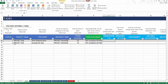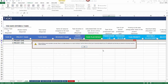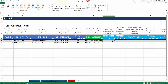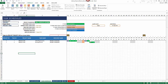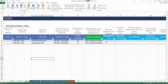Another scenario is when two tasks are interdependent — for example, task two is dependent on task one, and task one is dependent on task two. This also creates a circular reference. Removing one of those dependencies resolves it: task two will begin only after task one is complete, with no circular reference error.